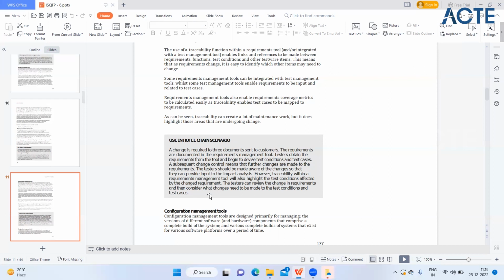Now, if you have traceability between your requirements and test cases, then if you get an alert that these 15 requirements are changed and you have written 50 test cases for these 15 requirements, you can check your impact analysis, convey your findings accordingly, and update your test cases for those requirements, so that a new traceability matrix will be created. Okay, so this is for requirement management.